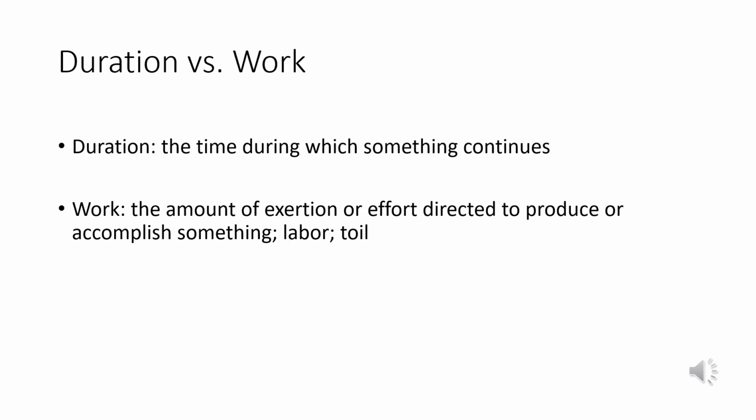So what is duration? Duration is basically how long a task is going to take. Work is the amount of effort it's going to take to finish that task. So let's say I've got Gary Clark. I say, hey, you spend 50% of your time working on the lawn, 50% of the time planting trees. If I wanted to shorten the duration, I said, okay, Gary, you spend 100% of your time doing the lawn,